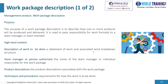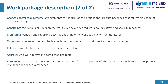The third management product is the work package description. Its purpose is to describe how one or more products will be produced and delivered. It is used to pass responsibility for work formally to the team manager or team member. Contents include a description of work to be done — a statement of work and associated work breakdown structure — the name of the team manager or individual responsible, product descriptions associated with the work package, relevant techniques and procedures for how the work is to be done, and change control requirements covering arrangements for control of the project and project baselines that fall within scope of the work package.